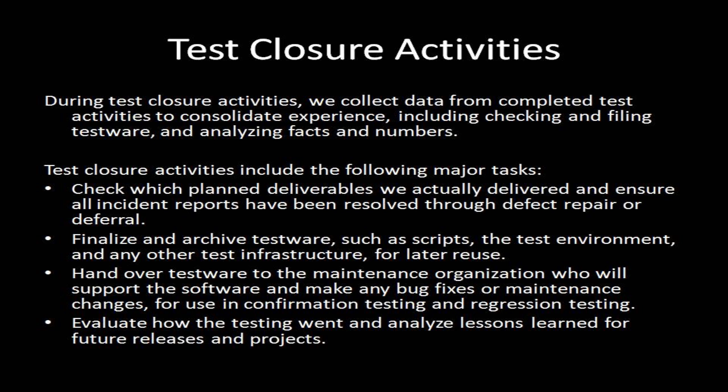3. Hand over testware to the maintenance organization, who will support the software and make any bug fixes or maintenance changes for use in confirmation testing and regression testing. This group may be a separate group to the people who build and test the software. The maintenance testers are one of the customers of the development testers. They will use the library of tests. 4. Evaluate how the testing went and analyze lessons learned for future releases and projects.